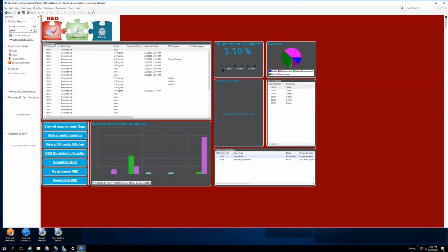that just says maybe one little piece, one little requirement of something. My statement of work might be like implement incident management. That's my statement of work, and then all of my various pieces of that are going to be my individual requirements. My change would probably be downstream from there. Once I get done with everything, that's where my change comes in. It could even be that I'm using this to track my building of my Cherwell implementation, and so I'm not going to have a change management system until I've actually completed this process.